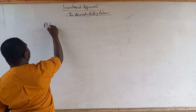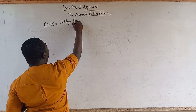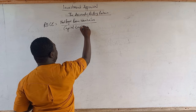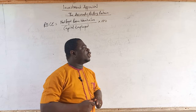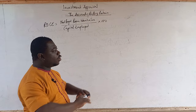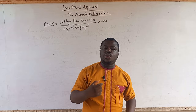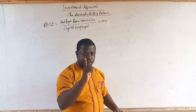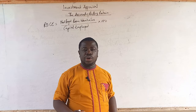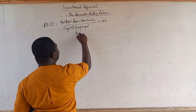The return on capital employed formula is net profit before interest and tax over capital employed times 100. The accounting rate of return formula also uses accounting profits before interest and tax for the specific project over the capital employed. There are two different ways of finding your accounting rate of return: using the initial investment approach or the average investment approach.